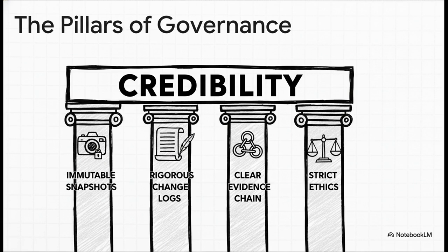First, you're using unchangeable snapshots of data. Second, you keep meticulous logs of every single change made. Third, you need a clear evidence chain, think photos, site diaries, for every single day you recover. And finally, there are strict ethical rules. Absolutely no cosmetic fixes, or what people in the industry call float massaging, which is basically just moving things around in the schedule to hide a delay without actually fixing it.